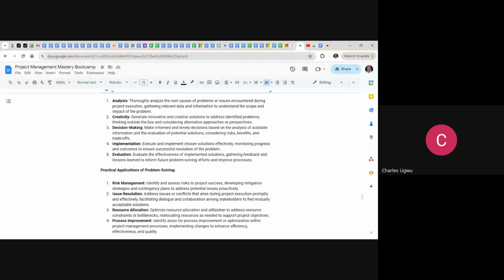While you are submitting a report to the stakeholders, you capture lessons learned. While you have a meeting to prepare for the next week, you capture lessons learned. What have you done this week that didn't go well? How did you solve so many of the problems? How did you resolve this issue? Have you closed this issue or problem in the RAID log? These are questions you need to ask during the lessons learned meeting.